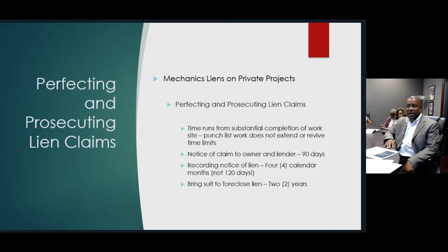So with that said, that is one of the baseline dates, the substantial completion of your work. Again, this is a documented process where the architect will provide its certificate to indicate that your work has been completed at a certain time and start the clock to move. A notice of claim to the owner and to the lender must be done within 90 days of substantial completion.